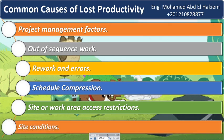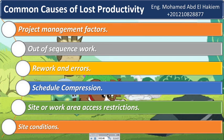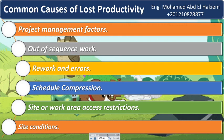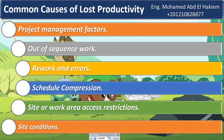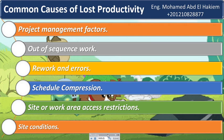Twenty-four: site conditions. Physical conditions such as saturated soils, logistical conditions such as low-hanging power lines, environmental conditions such as permit requirements prohibiting construction in certain areas during certain times of the year, and legal conditions such as noise ordinances precluding work prior to 7 a.m. or after 6 p.m. may all negatively impact productivity. Twenty-five: untimely approvals or responses. When project owners, designers, and/or construction managers fail to respond to contractually required submittals or requests for information in a timely manner, productivity may decline as crews may not have authority or sufficient knowledge to proceed with their work.